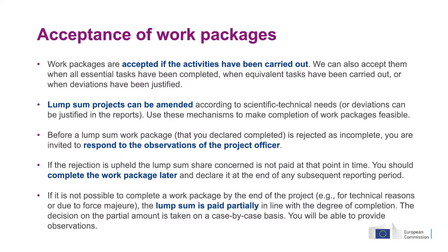I mentioned that the system, of course, depends very much on when and where and how we accept work packages, because you carry out the project, you report work packages as completed or as partially completed at the end, and then the project officer takes a decision whether or not they accept that. Now, generally speaking, the general line is we accept when you have done the activities. I've mentioned that several times. But I assure you that we don't really expect lump sum projects to perform to a higher standard or better than actual cost grants or any other grants.